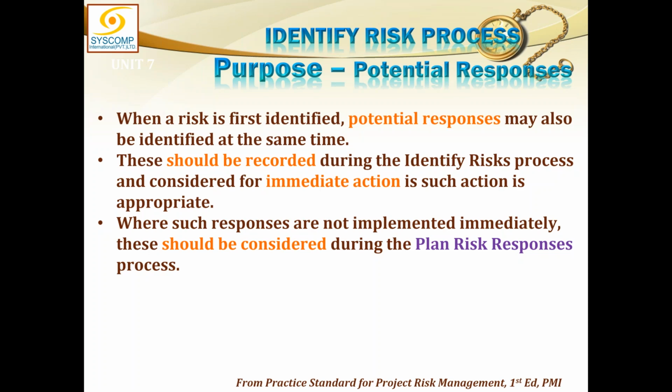Where such responses are not implemented immediately, these should be considered during the plan risk response process. So I have collected the potential responses at the outset. For the emergent risks, I may have implemented them immediately. But for all other risks, it is not mandatory for me to adopt those potential responses, but they may be considered when I am developing the plan risk response. So these suggestions may be considered, and naturally I would select the best possible response at that time. So we at least will have something to start with.